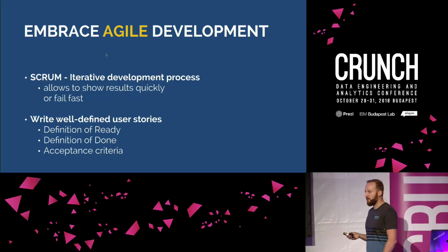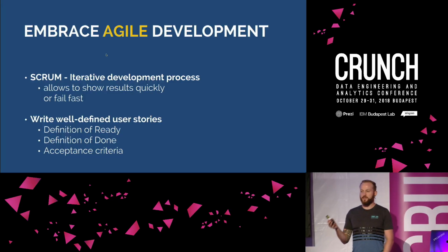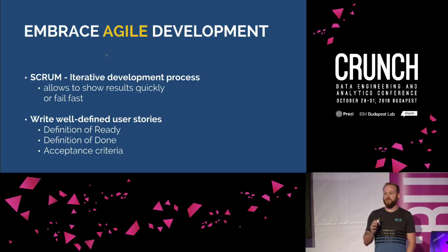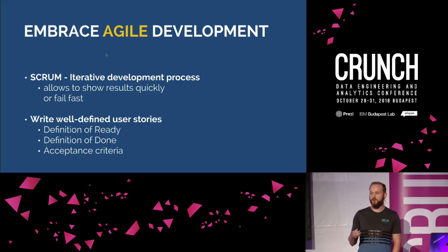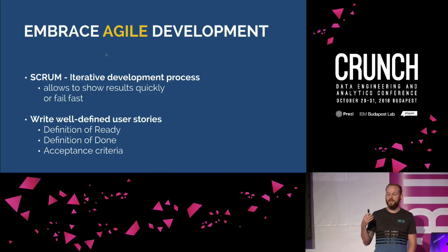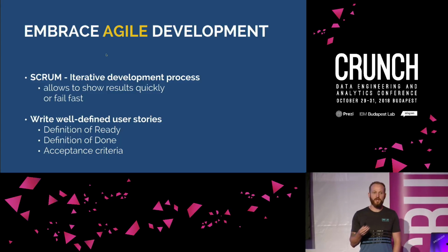What we are doing right now is that when a request comes in, and we don't understand in detail what the request is about, we sit down with the stakeholders in a story writing workshop and define in detail what they actually want.